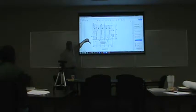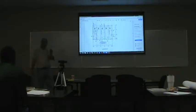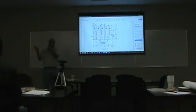Okay, you're gonna lay it out from back to front. You're gonna get that back wall in place, you're gonna have these anchor bolts in place, and everything is going from back to front. If you go from front to back, you may end up with bad dimensions because the architectural details, as a general rule, are gonna be wrong on the front of that building. Architects are gonna make mistakes. So you gotta work off the center line of your anchor bolts, and everything on that fascia works with the center line of your anchor bolts out. Am I making sense here?